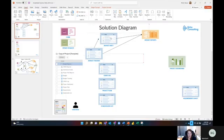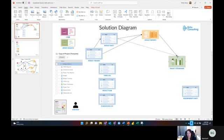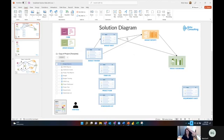The budget tracker feeds into the budget sheet, which is a roll-up, and both of these go into the budget report. The budget reports then go directly to the project dashboard, but the budget sheet also goes to the dashboard as well. For example, the total budget and spent-to-date metrics that show up on the project dashboard pull directly from the budget sheet. Past due invoices, for instance, would go into a budget report that would then feed the project dashboard.